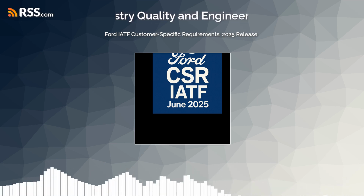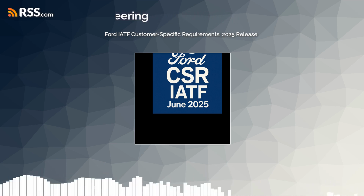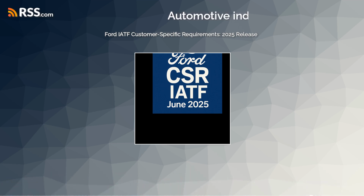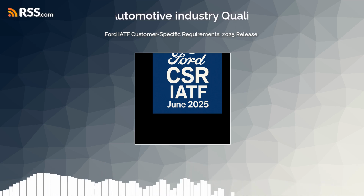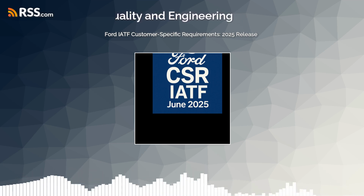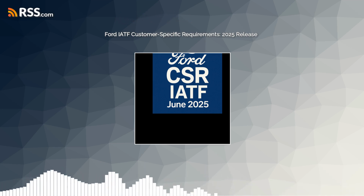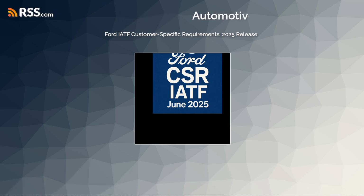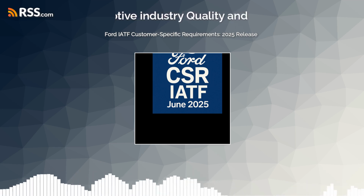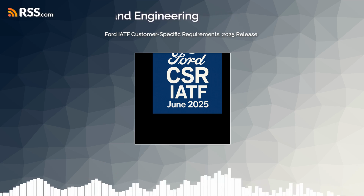It often involves things like 100% inspection of certain characteristics, increased frequency of testing, enhanced documentation, maybe additional checks by operators or auditors, or specific error-proofing methods applied temporarily. The goal is to ensure that any issues arising during the early production ramp-up are identified and contained immediately before a non-conforming product can reach Ford's plants. There are specific exit criteria that the supplier must meet to transition from the pre-launch to the standard production control plan, especially for priority suppliers.